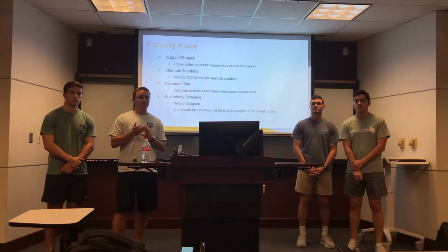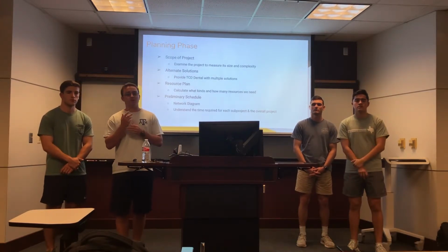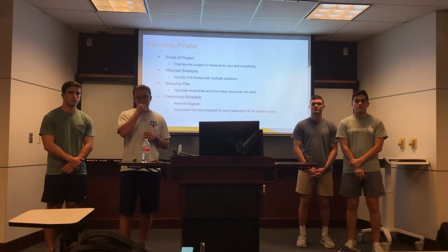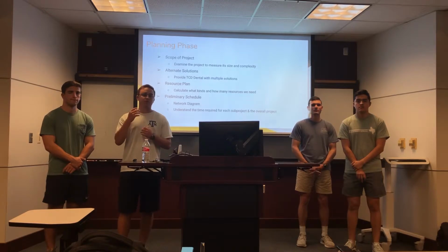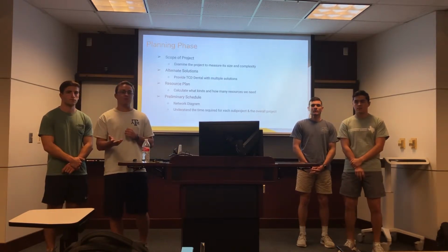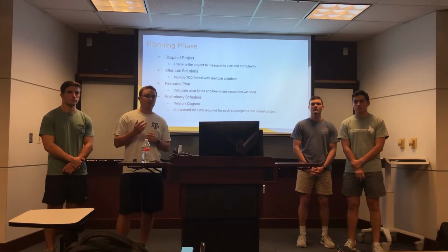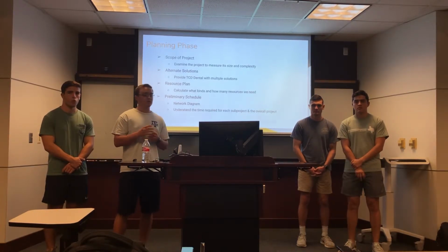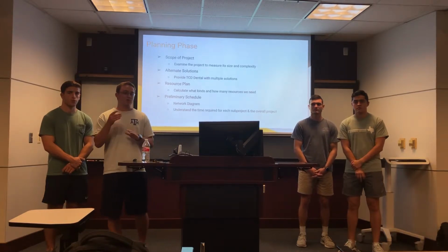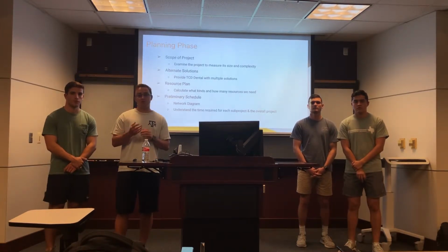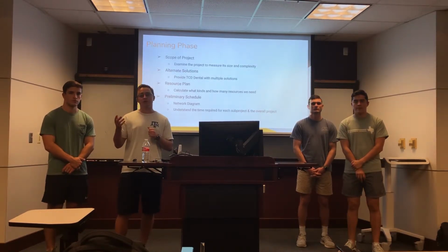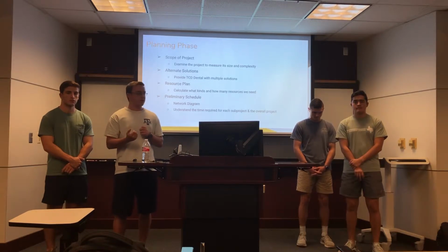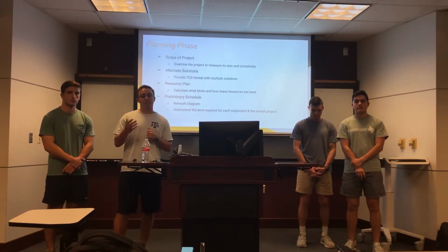Going on to the next phase, which is the planning phase. This phase will start off with us examining the project and understanding how big, or in other words, the scope of the project and how complex it is. We will then present to you about one to 3 solutions, which will allow you all to pick whichever solution y'all believe is the best one for your needs. We will then include what we call a resource plan, which will show you all the resources we will need. For example, if we need to bring on a third party to perform some part of the project that we cannot. And then finally, we will develop a preliminary schedule.